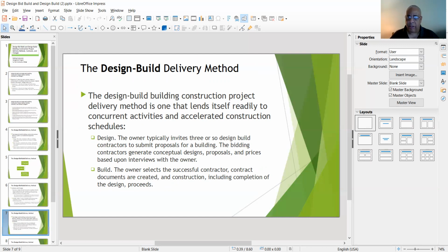Now, with designs, there are going to be some changes. Usually that happens. Something to tell you when it comes to construction: before anything takes place, you should check the design. Why? Because when you have a contract, you want to try to alleviate a number of change orders.